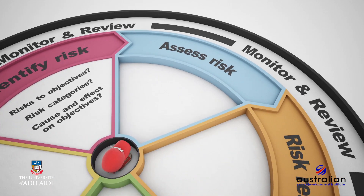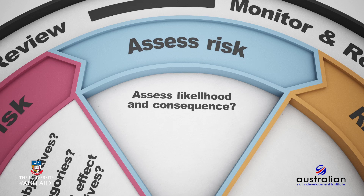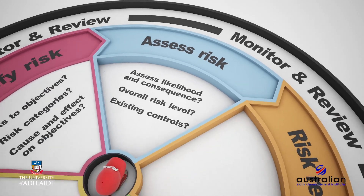Step three of the process requires us to assess the risks that we have identified in stage two. For each and every risk identified, we now have two further questions to consider. The first question is: what is the likelihood of this risk actually occurring? The next question moves to thinking about the possible consequence to your project objectives should the risk occur. A combination of both the likelihood and consequence discussion enables an initial risk assessment to be performed. A number of tools have been developed for this type of qualitative risk assessment, often referred to as the risk assessment matrix, which we will illustrate further in the coming sections of the course. Key questions include: how will you assess likelihood and consequence of each risk? How will you determine the overall risk level? And are there any existing controls in place?